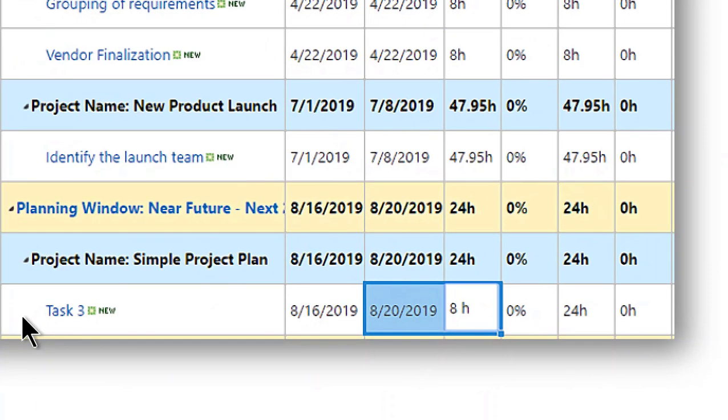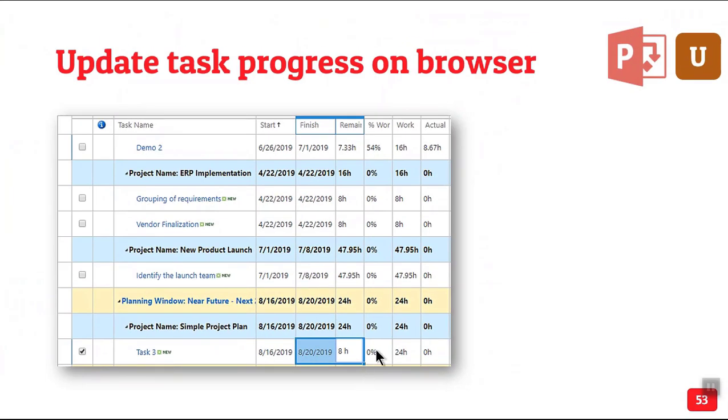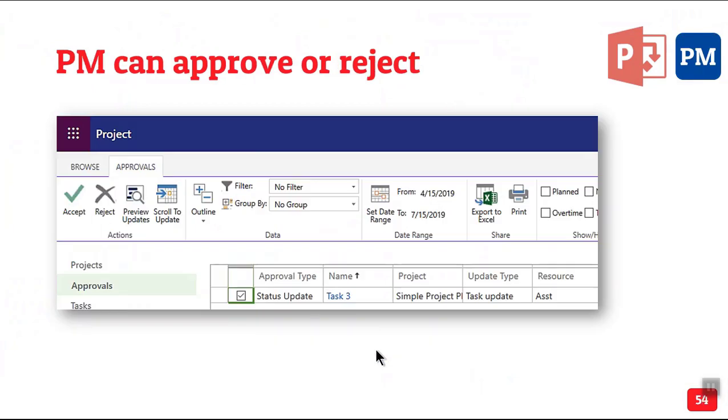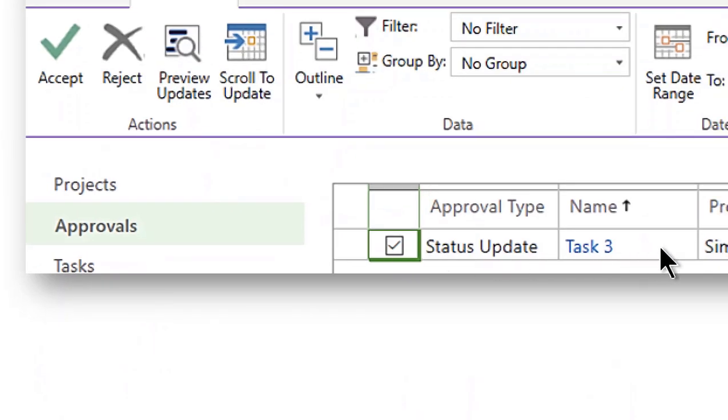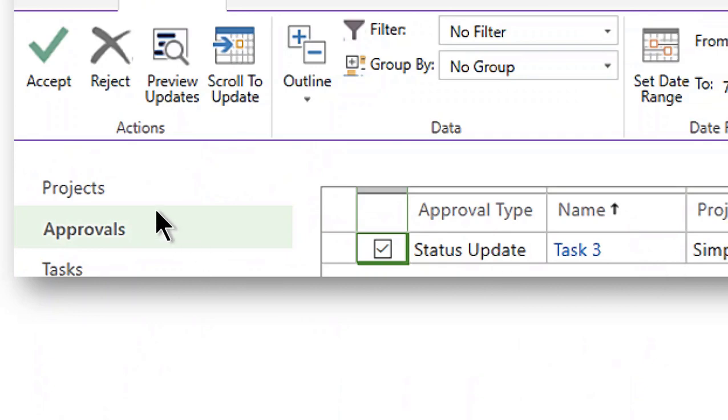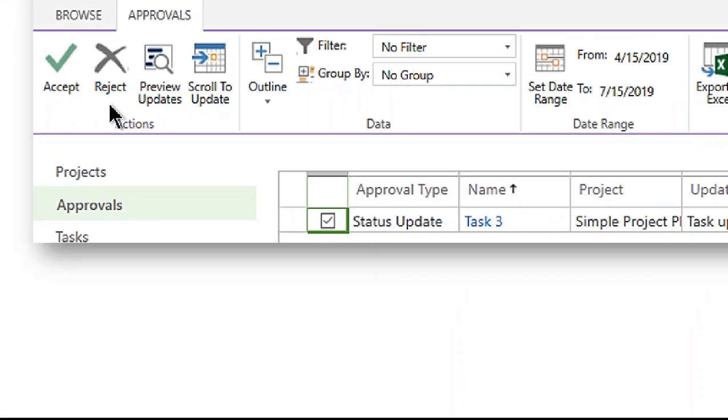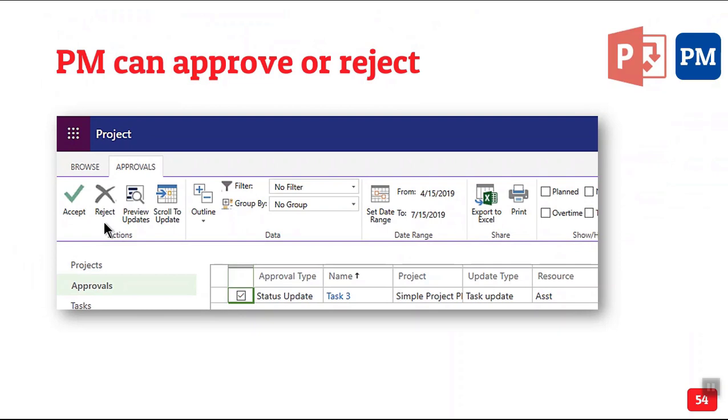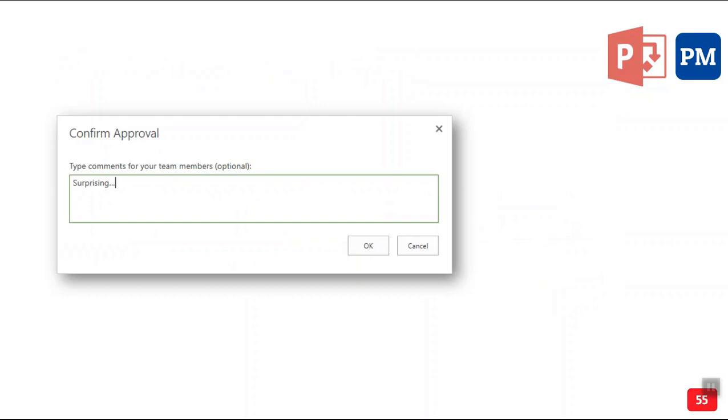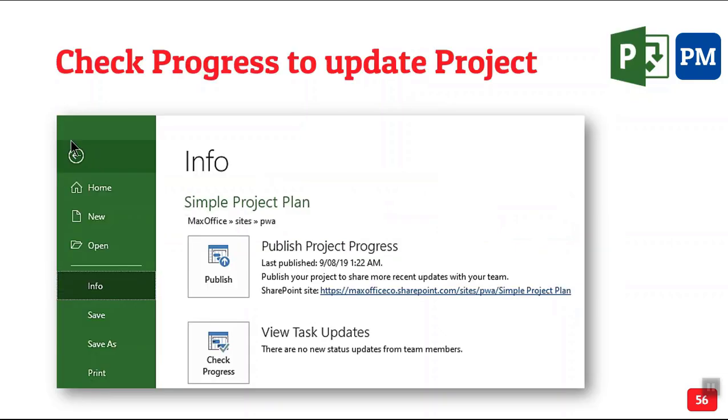Now, if this person says the task is complete, it does not update the project. Project manager now is looking at approvals online. So project manager will see the status update. If this person wants, they can accept or decline or change the number. This workflow is built in. You don't need a workflow software for this. You can customize this workflow. Sometimes when I add a resource, there is a resource manager that team's boss who has to approve, will allow this person to go for this project. So that resource manager approval is also built, which I'm not showing. So when you confirm the approval, when you confirm the update, you have to update the project.